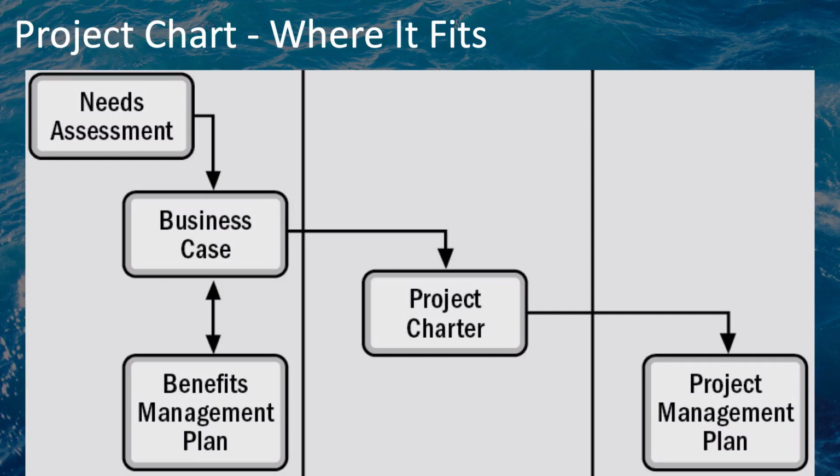This is followed by a needs assessment, then the creation of a business case, and the creation of a project benefits management plan. All of this prior work is then used as inputs to the develop project charter process, particularly the business case. The project charter, in turn, is used as a key input to the creation of the project management plan and all of its component plans.